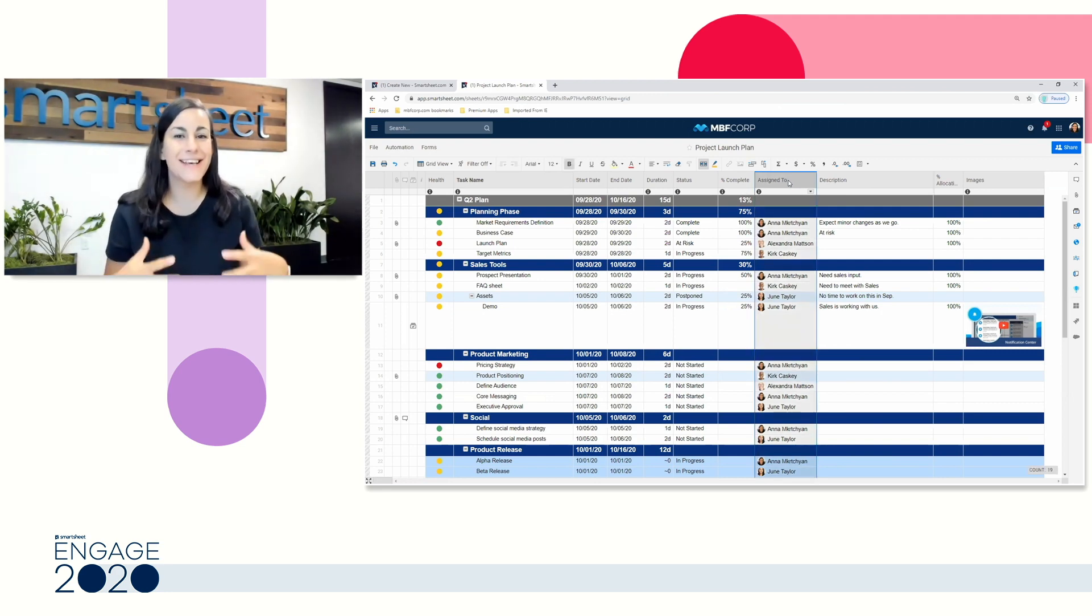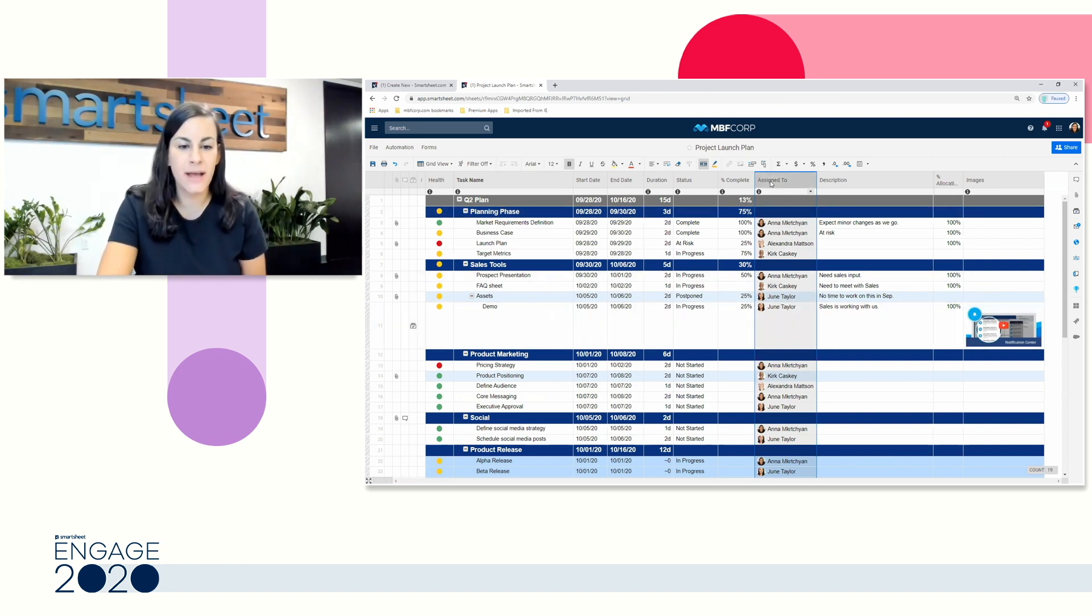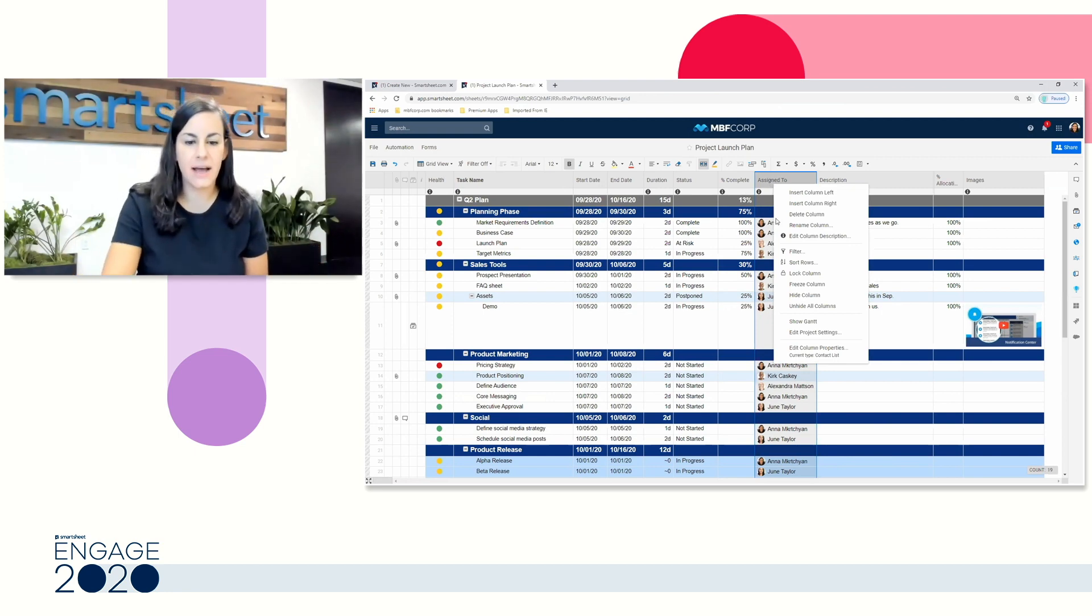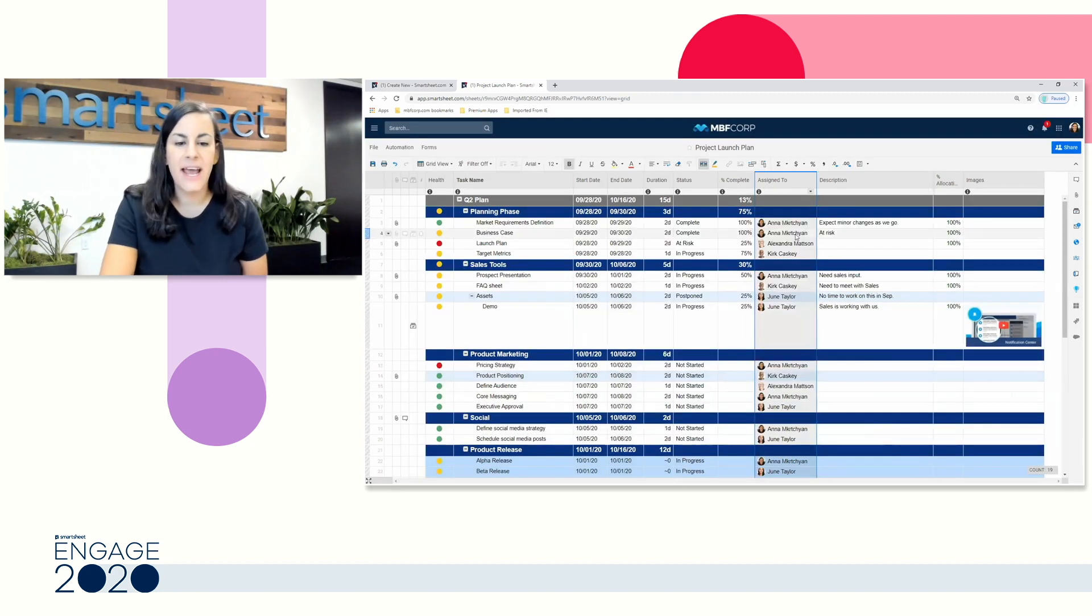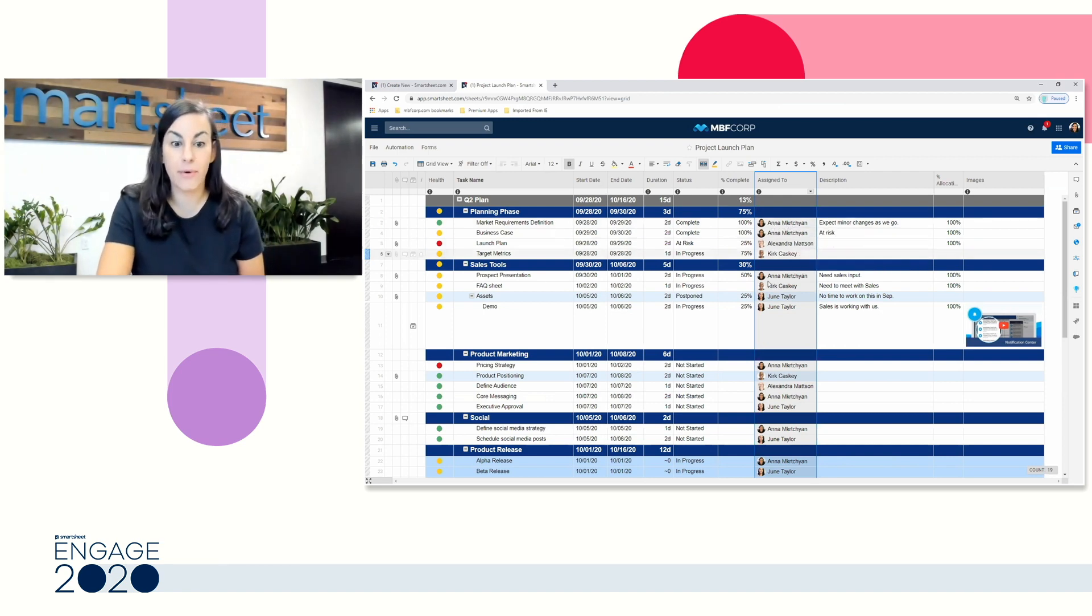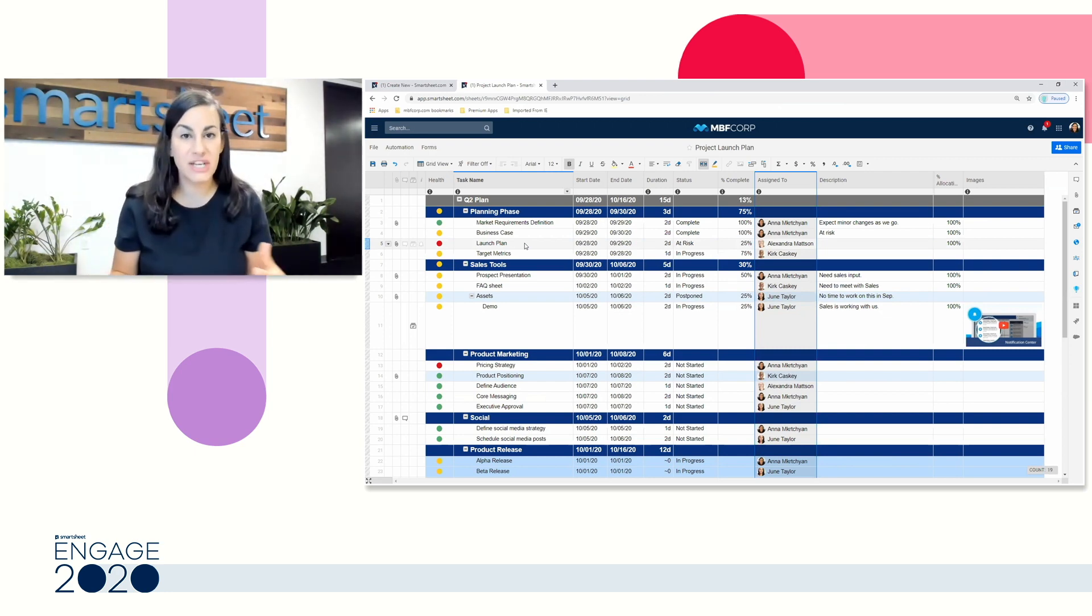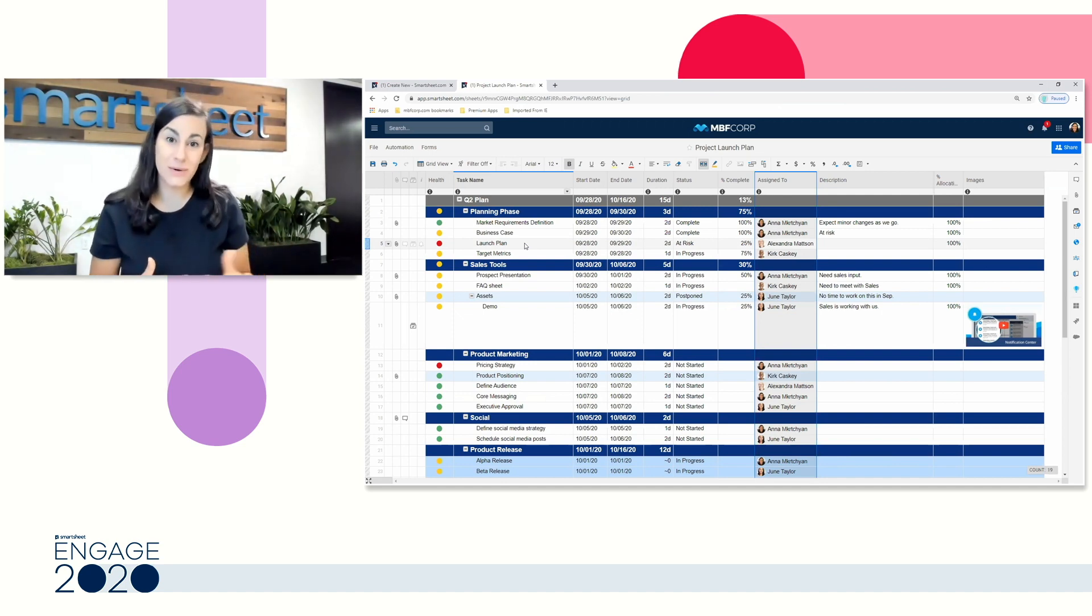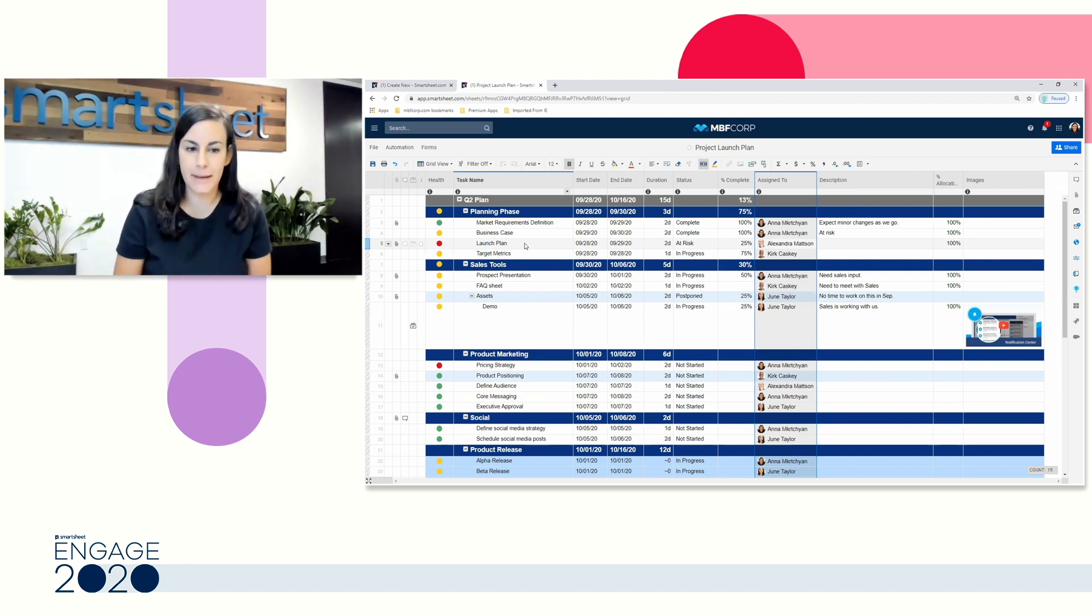Next up, we also have our contact list column. This is equally as important as our date column because it allows you to assign work. Instead of just typing in, here's a task assigned to Anna, I can go into my column properties. You'll see I already have contact list selected. This way, I'm assigning work to the actual user. You'll also see that the profile for each user is showing up as well. Assigned to columns are important because again, we know where to send automation, letting users know when they're being assigned. We can track resource allocation, so flagging if anyone has too much work assigned to them and all of that is powered by selecting that correct column type.